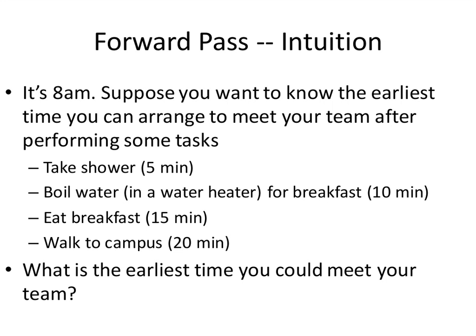Okay, so you can take the shower and boil the water at the same time, but can you start to eat? When can you start to eat breakfast? After you're done with both of those, right? And you can't start that until the maximum of these times are finished, right? You're constrained by boiling the water. You could take a super fast shower, or you could dawdle in the shower. But the thing that's probably going to be the big constraint here is boiling the water.